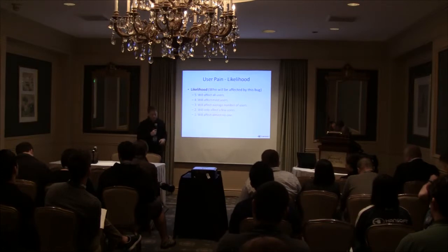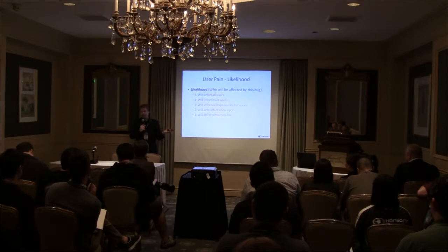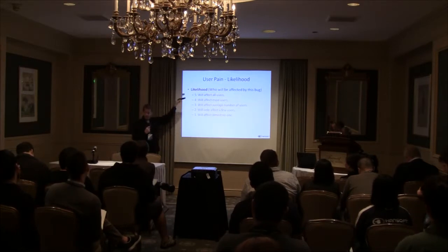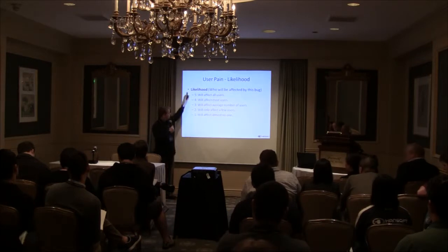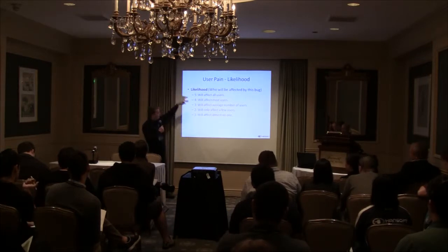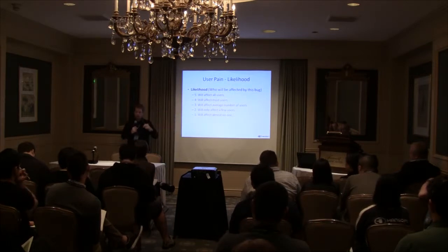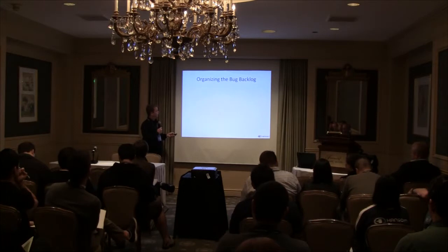I got a bug back from QA one time that took 17 steps to reproduce. It was a valid bug, but it's probably not one in this example that I'm going to fix right off the bat, right? Because almost nobody's going to go 17 steps on this controller to get to this particular bug. So try and use these to decide what's most important to the end consumer, what's most important to the people actually playing the game.